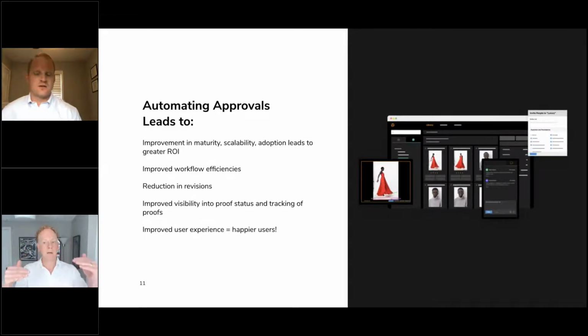So tier 1 content might have these different stage gates where it has to go to your art director, creative director, back to the client, etc., legal even potentially, versus tier 2 and tier 3, we may be able to leapfrog some of that and bypass different approval stage gates. But this is another, similar to the way we talked about task workflows and automating that to trigger that, approval workflows also are a very easy entry point to increasing efficiency and speeding up your overall process.